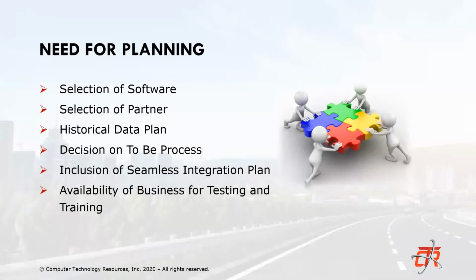We had various intervals of training. We had the CRP1, the CRP2, and the full training. We usually do the training towards the end, right before we migrate, just to make sure people are fresh and know exactly what we went over. But we had a few mid-training sessions in between just to get people ready. We brought them in specifically to their module, with training sessions for GL, for FA.